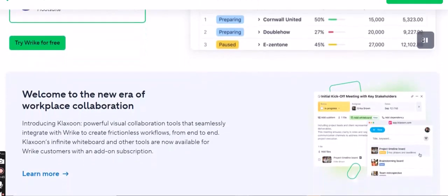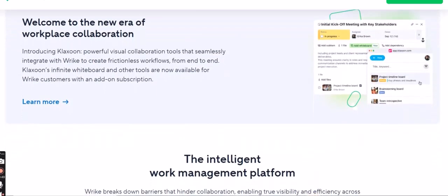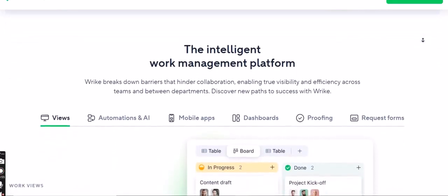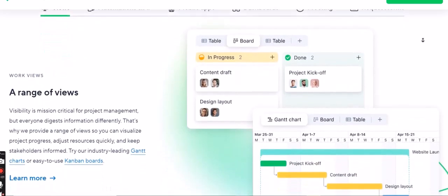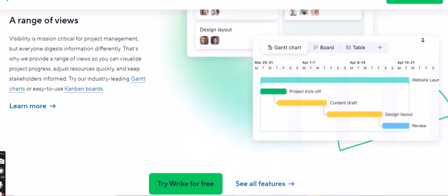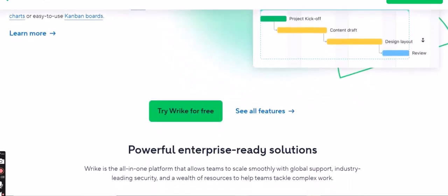1. Planned effort, setting the stage for success. Planned effort, often referred to as estimated time or original estimate, is the initial prediction of how much time a task or project is expected to take. This estimate is typically made during the planning phase, before any actual work begins. It's the baseline against which we measure actual progress and identify potential deviations.